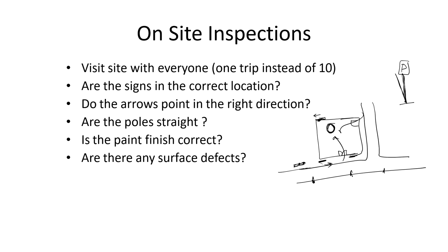This is a job of a signage designer, that they have to check, due to this lighting, is there any glare which has been created? If so, then we need to change the locations. Similarly, when we install the ceiling mounted signage, many times we see that the alignment is not proper.